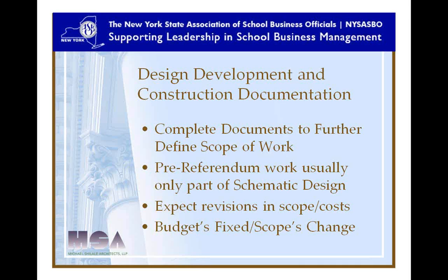As I said before, your pre-referendum work is really only about, we consider about 50% of the schematic design, so that you will have quite a lot of development in your design, and when you produce the final bidding documents or construction documents, you should expect some revisions in your scope and in your costs. Now, our budgets are fixed. We know that. We put it out for a particular budget. So if there is going to be a change in scope, something else has to change as well.